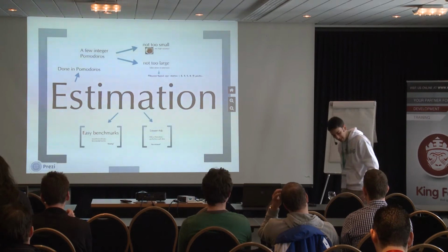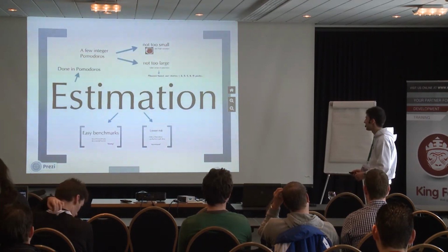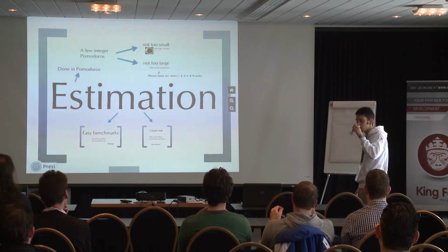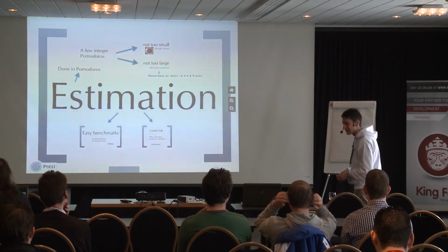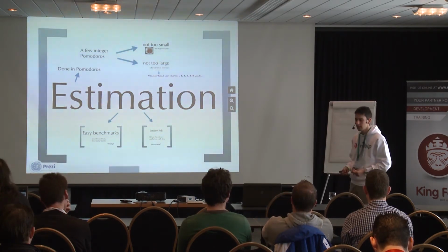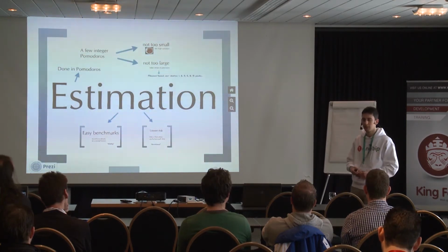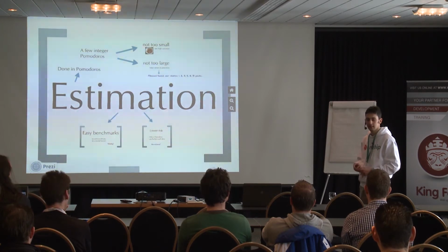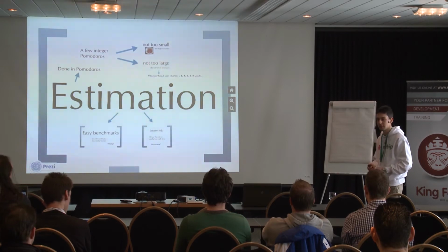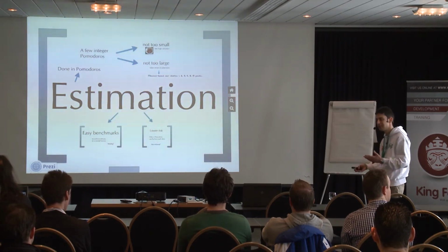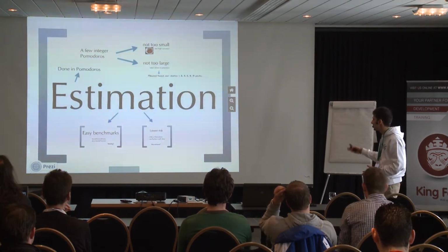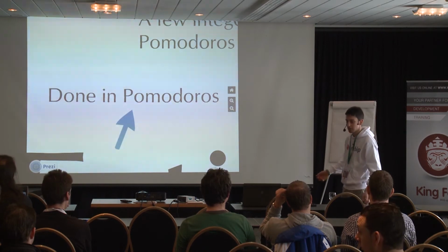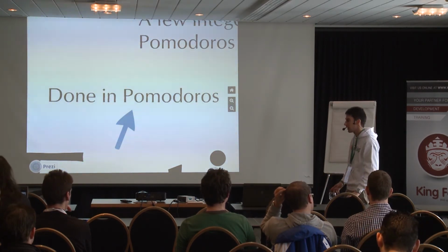So we have finished, with a little bit of anticipation, the chapter on interruptions. In the next Pomodoro, we will talk about estimation. Since the Pomodoro is about to ring, I won't go into detail immediately, but it is perfectly fine to estimate things in Pomodoros if they are of the correct size. We will see that you can estimate tasks taking from 1, 2, 3, 4 Pomodoros up to maybe 10 or 13, but it becomes more difficult as you get to larger numbers. So what we estimate are tasks, not stories, so smaller scope, and we do this in Pomodoros.